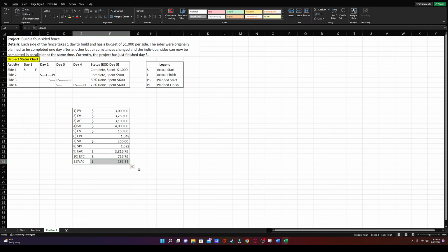The VAC is one of the ones where you need to understand that if it is positive, it means that we're under budget. If it is negative, it means that we're over budget, right?